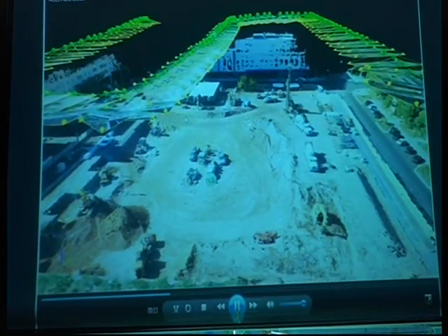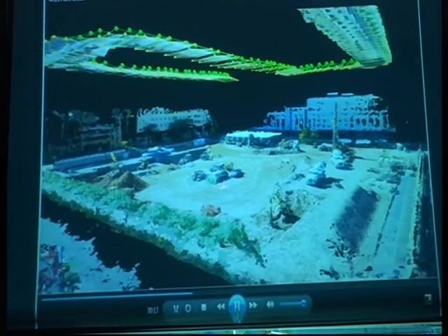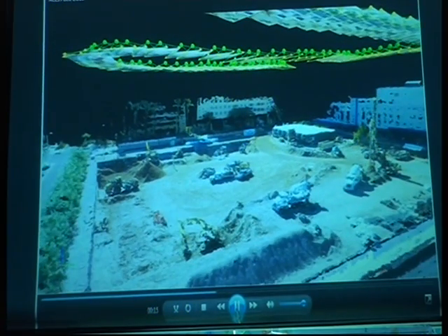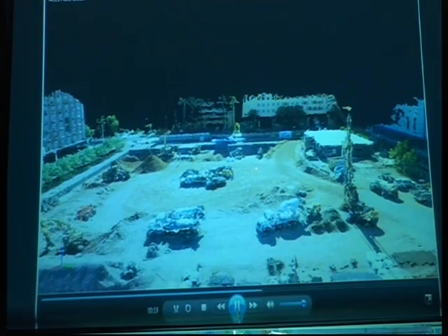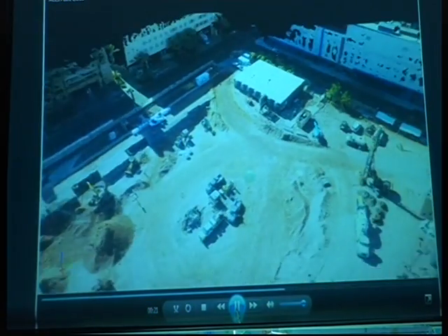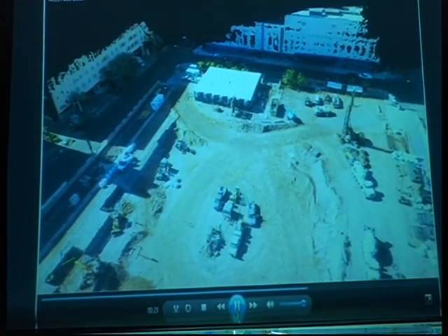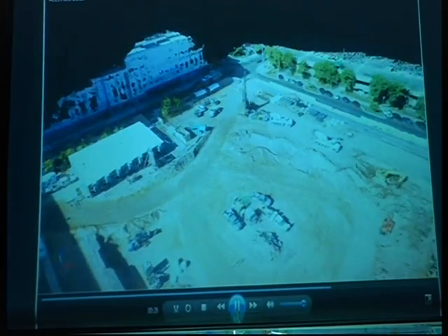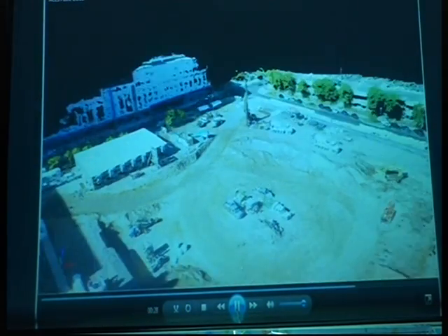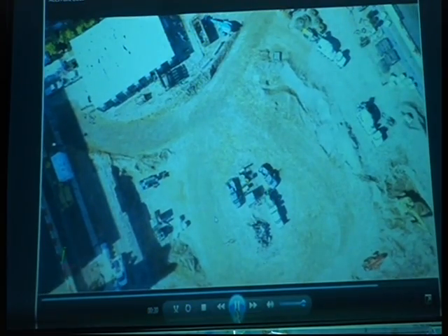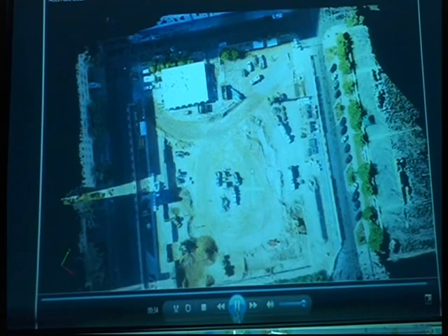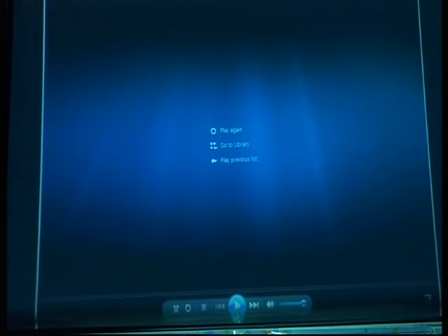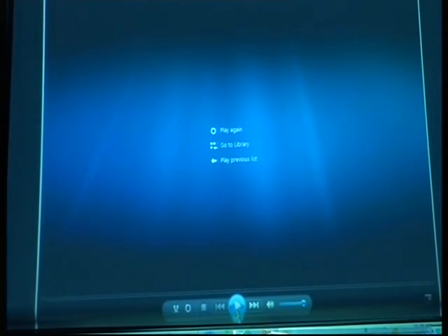So the cut and fill, more specifically on the civil side, right, is that you've got to cut and you've got to fill and you have grades that you need to maintain. And these types of models will allow us to quantify what have we cut, what have we filled. And so again, this is emerging technology. This is not prevalent. This is not on every job site. But again, it helped us capture what has been installed and compare it to the design.